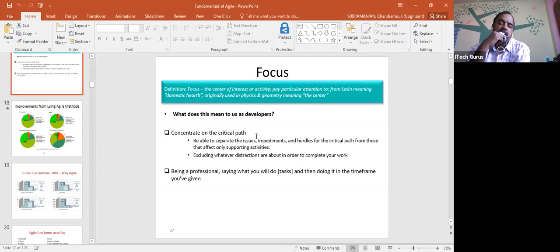See, for example, let's say that I am doing a work after Narendra does some task. Task 2 is to be done by Mowli, task 1 needs to be done by Narendra. Please understand very importantly, if Narendra takes a lot of time to finish task 1, Mowli cannot take task 2. Hope you are able to understand what I'm talking. Yes. Okay, so please understand that is very, very important.